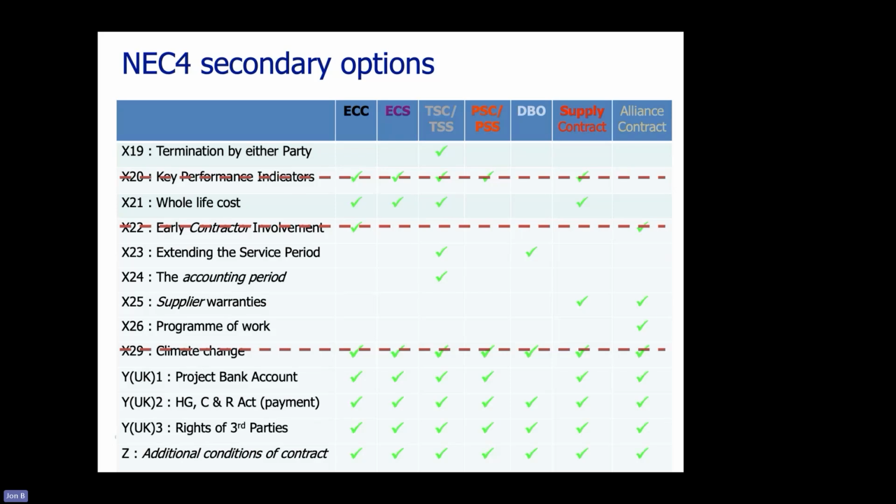The problem I have with it is twofold. One is basically the contractor comes up with a suggestion, runs it by the project manager, and then they've got to put forward proposals for how much money they're going to get as a share of the savings. So it seems remarkably vague on how any share of savings is calculated. And I can quite imagine, as you get with target cost contracts, where the contractor comes up with a whiz-o-whiz idea to save capex cost, project manager dismisses it, and then 3 months later has a remarkably similar idea and gets all the benefits of it on behalf of the client. I can quite see that happening with these suggestions, even more so.